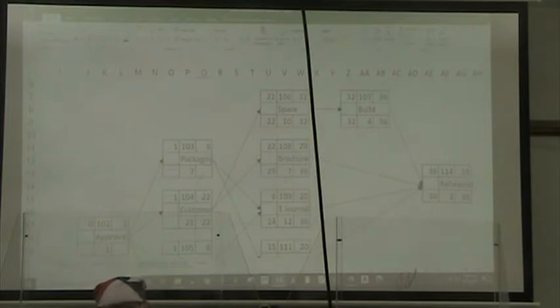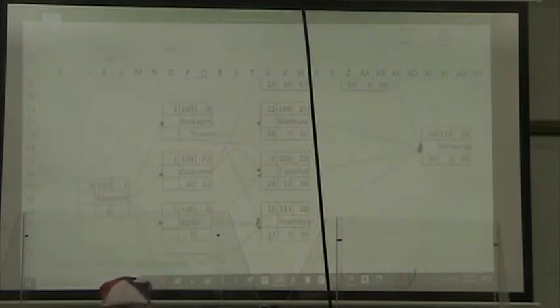And so we look at all of our activities through that lens. Here we want the earliest time that we have a late start. So equals MIN, left parenthesis, putting it in the trade journals, doing the trade journal thing, comma, and building wine to inventory.